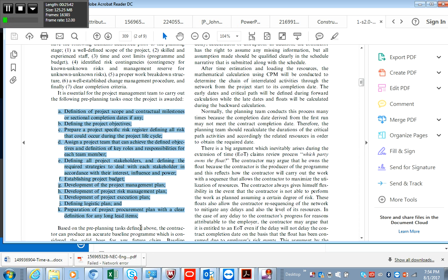So in an instance like that, that could delay works, because if that bulkhead took 10 weeks to manufacture, what that means is you're going to have a 10-week lead time to incorporate into your program if you can't find any other variations to input or to install that bulkhead. Okay, so in a situation like that, you can actually apply for an extension of time as a main contractor,